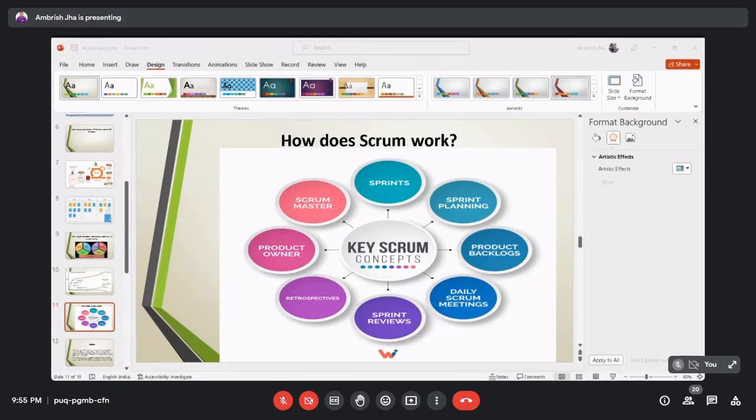So we have the sprint backlog. We are moving the tickets or task issues into a particular sprint. And then we start the sprint. Starting the sprint means what? Once the sprint is started, usually we do not change the goals, or add or remove any tickets from the sprint. It is locked and the sprint has started.